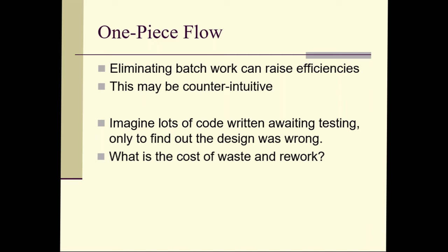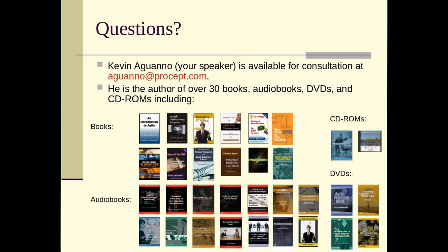So that's what we're talking about, this introduction of waste and rework as a way of slowing down overall efficiency, but we still have to look at our process flow as well. Batching increases flow, but introduces the risk of dramatic waste and rework. It could actually kill the flow for a while if there's a change, right? It's a huge, massive disruption. So that may be too much risk to take on.